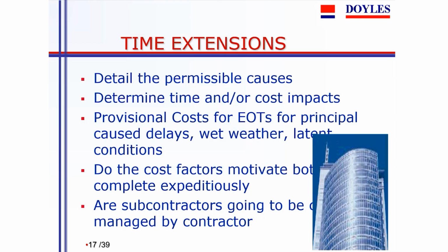And the situation is that if there is a fair allocation of the costs of extensions of time between principal and contractor, often they're both incentivised to make the project run carefully. If the principal bears none of the risk, then the contractor has to wear it, but eventually he looks for claims that he can pursue on other levels, as well as the time extensions, in order to claw back some of the loss that he's suffered as a result. So if we go to the next slide.